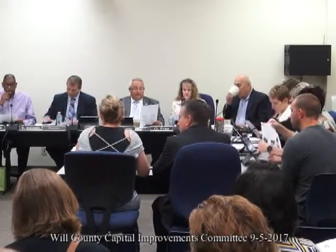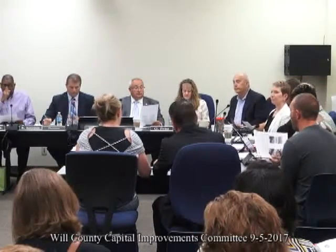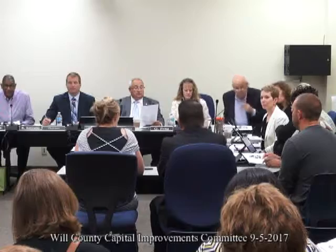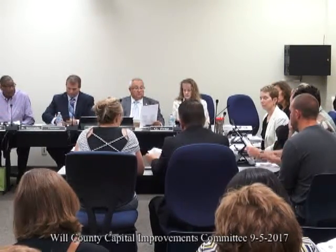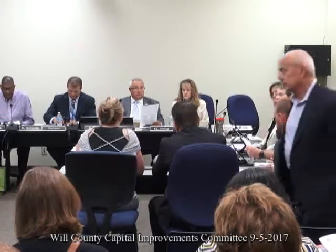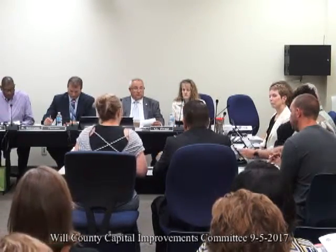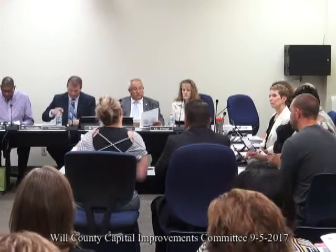Good morning, everyone. So, as the chairman said, we did substantially complete Area A, which is the 911 portion, on Friday. So the group is starting to move in. I believe tomorrow is their first big D-Day for the first portion of their vendors. The furniture will go in and we'll start to do all of their wiring and things like that. So we need to turn that over ahead of time so it can go hand in hand with the Area B portion and all get up and running at the same time.